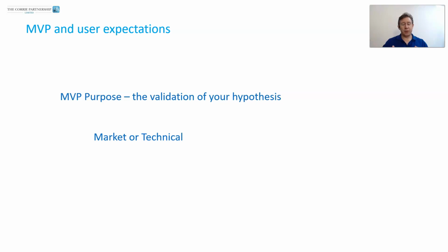The waterfall, the traditional project management approach to minimum viable product is of course different, and this happens because we build from the product backlog in a different way. Agile delivers based on value, maximizing value at the beginning of the project, whereas a traditional plan-driven approach will not necessarily deliver the most value at the beginning. They tend to deliver in such a way that there's a big bang at the end, and it needs to be complete for there to be any value at all.